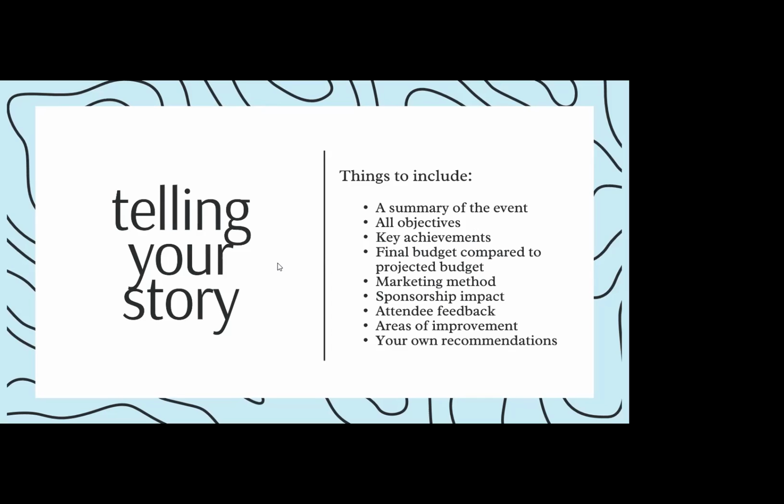Here is a list of some things you can include in your final event presentation or your event report. A summary, all of your objectives and your key achievements, that final budget compared to your projected budget. What was your marketing method? Highlighting sponsors and how they impacted your event. You know, your donation of $500 allowed us to have X amount more vendors, very clearly showing where their role played a big part.